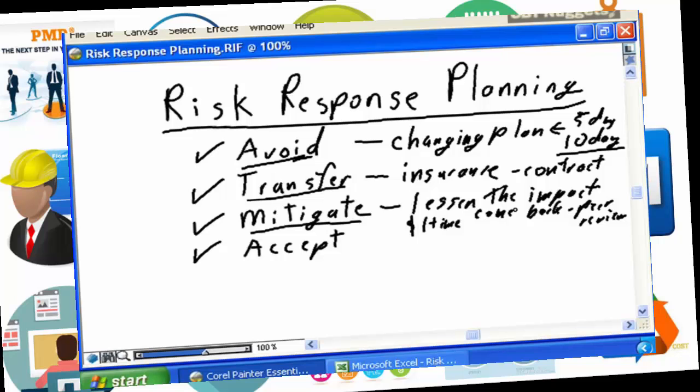So over and above the incremental costs that you put into the project plan to have the trainer come back, you need to build additional contingency into the plan to deal with the risk should your mitigation strategy be insufficient and you still suffer from inadequate training.